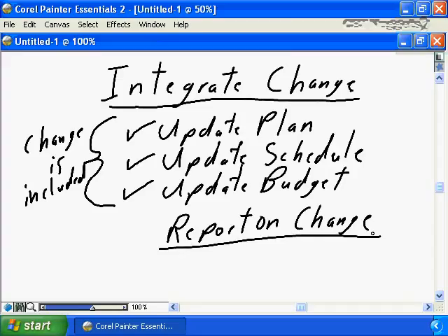We're telling everyone that our project officially approved end date is now 3 days beyond the last forecast end date as a result of the change. And we're telling everyone the project is now going to cost $5,000 more because of the approved change. We have updated the baseline. The baseline against which you are being measured as a project manager has been updated because we have integrated the change into our project itself.